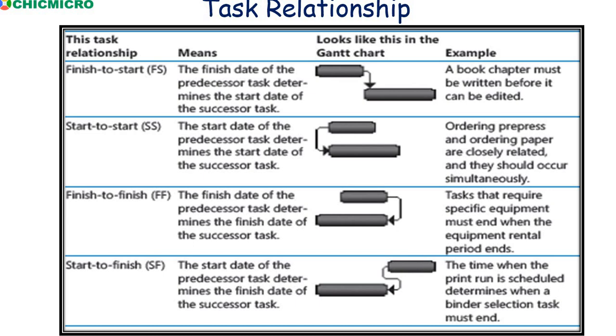Right? So in this way, we can have different examples, but the truth is, as a project manager, what you need to do is to know which task is depending on each other. What's the relationship between one task and the other task? Is it start to start? Is it start to finish? Is it finish to start? Or is it finish to finish? In that way, you can create a relationship with your tasks. Even when you have finished the summary task of one, you can continue the summary task on the other one. Especially when we're dealing with subtasks and tasks under the summary task.